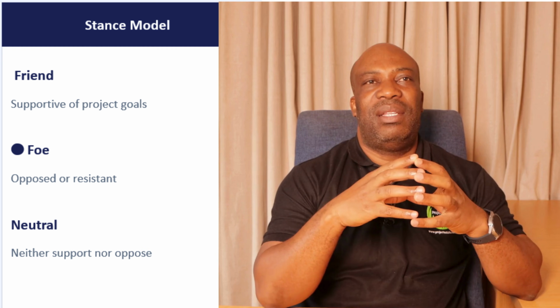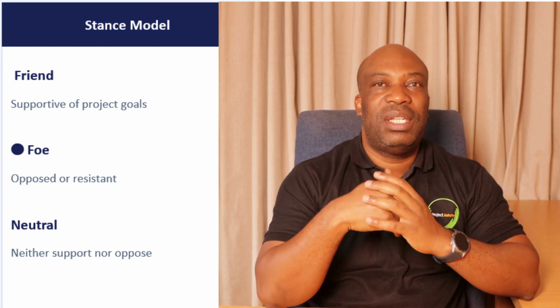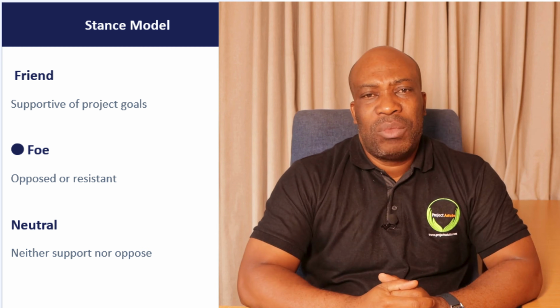So it meant that the whole department was going to be reassigned. And fortunately, they were all reassigned. No one was fired. So I had to take my time as a PM to understand why this stakeholder was so hostile, so resistant, saying this system will never work, we don't need it. We are okay with the old one. Then it was because they were impacted negatively. Their department was going to be disappearing and they were going to be reassigned to other work. So it's another stance scenario where you might find very resistant and also hostile stakeholders.